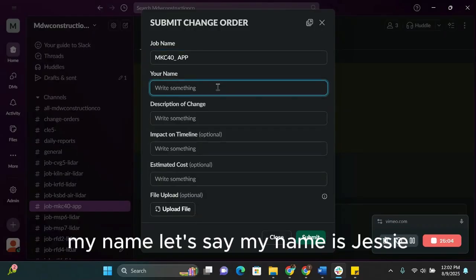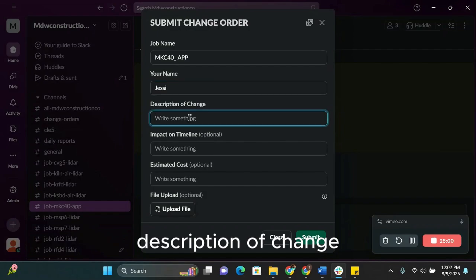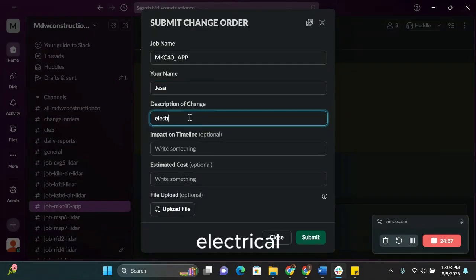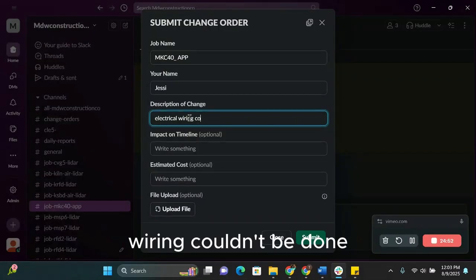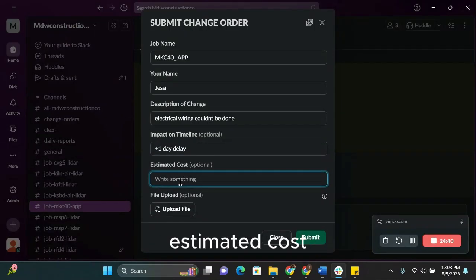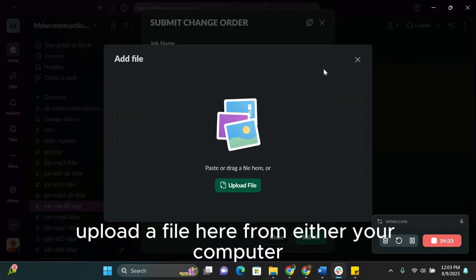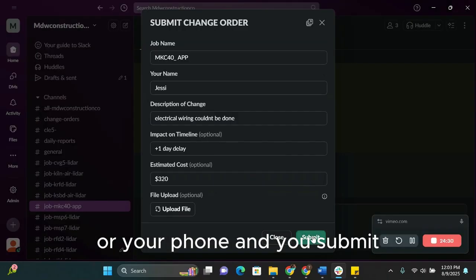My name, let's say my name is Jessie. Description of change, electrical wiring couldn't be done, impact on timeline plus 1 day delay, estimated costs, let's say $320, and then you upload a file here from either your computer or your phone, and you submit.